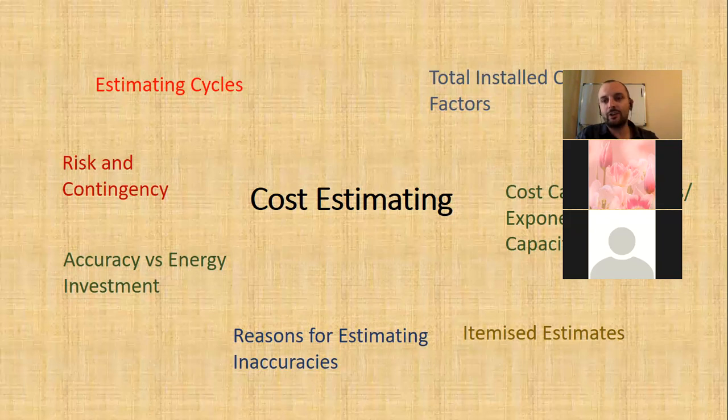But you need the early estimates in order to define the scope, because you could be saying, oh, that's too expensive. Actually, we need to lower the quality to bring the costs down or something. So that's why estimating is a process rather than an event.